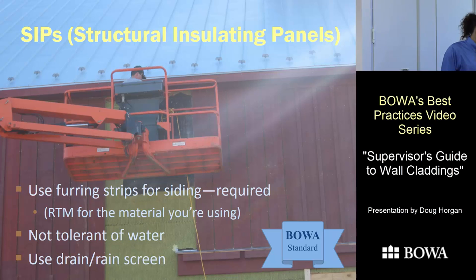And then one last quick thing. Occasionally we do projects with SIPs. If you read the siding books, they want you to add 3/4 or 1 3/4 inch of wood to the outside of the structural insulating panel for the siding to hang onto. So that's something to keep in mind when you're detailing these out or pricing them out. And because it's a structural panel, the OSB skin is the structure. We really have to protect that, so we're definitely going to want to use a drainage space on those.